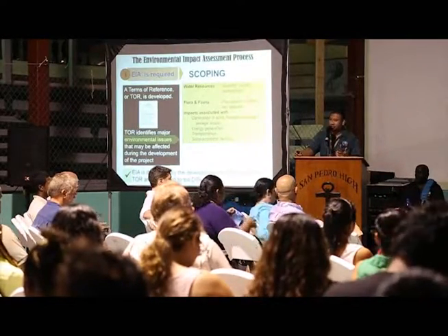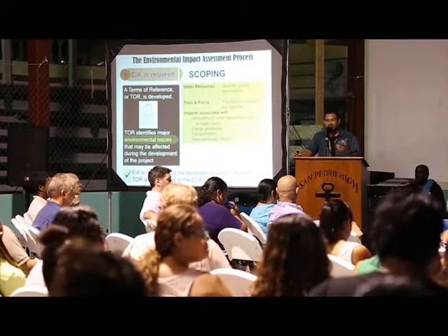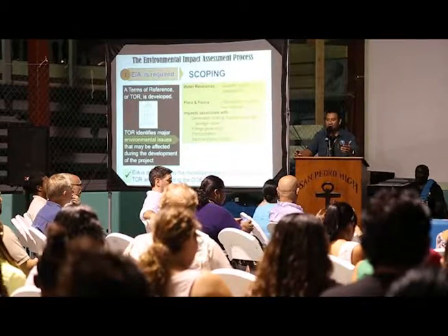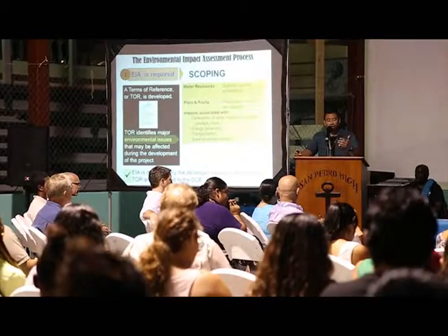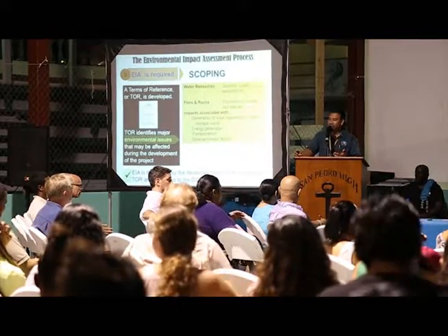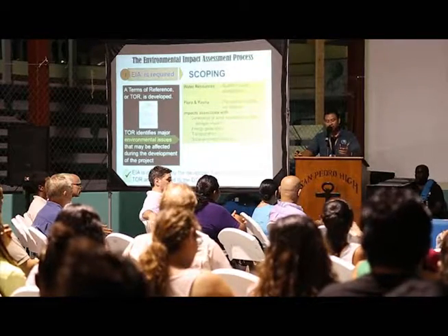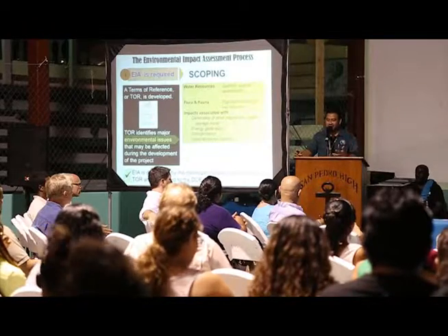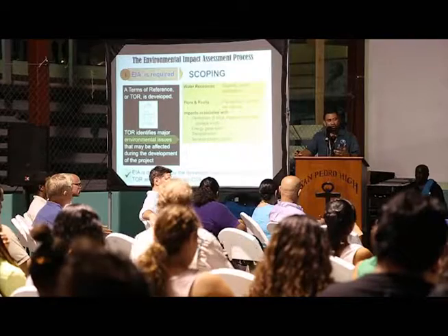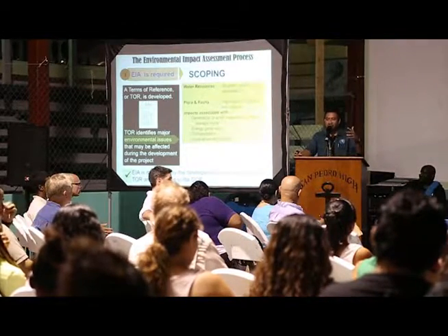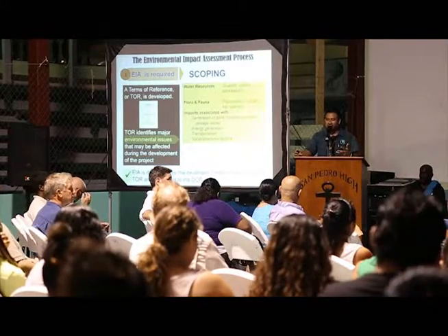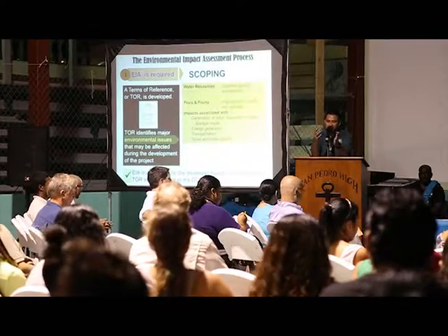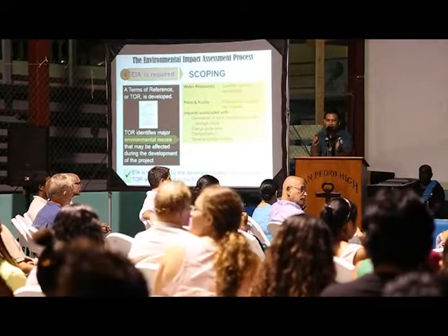If any one of you had an opportunity to look at the document, you would notice that as an addendum, as an attachment to it, the terms of reference is right there. And it outlines what needs to be provided. The terms of reference is also guided, mind you, by the legislation as well. Because the legislation determines what are the minimum requirements of an environmental impact assessment, and the terms of reference guides you in the relevant type of information to ensure that what the legislation requires is provided for. So scoping it from a wide perspective, it narrows it down to be specific to that specific location where this project is being proposed.